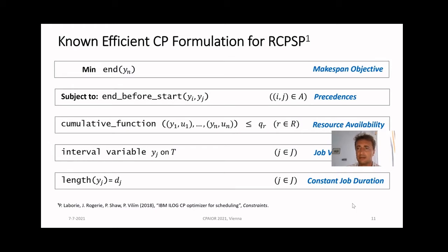Multimode is a concept that is commonly used in RCPSPs to express that a job can be executed in different modes, different ways. We here represent 2 different modes for a job as the regular mode, in which no learning takes place for a job, and the alternative mode, which is the actually beneficial learning mode, which is reduced in duration. We relate here the different modes and their presences by the precedence constraints to express it in the formulation.